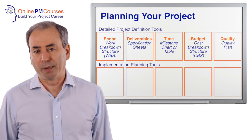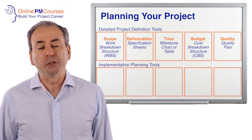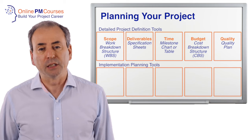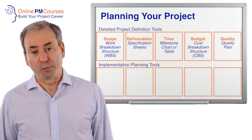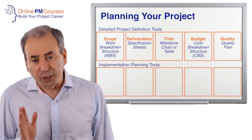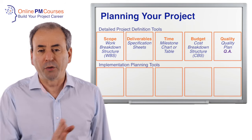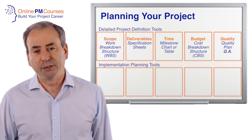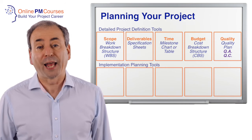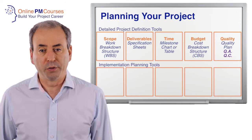Quality is the fifth component of our project plan, so you should have a quality plan which documents how you're going to ensure that the quality of all your deliverables meets the standards set out in the specification documents. Often this will involve two separate processes: a quality assurance process, which makes sure that the production of deliverables is designed to meet the specified quality; and a quality control process, which makes sure deliverables are not handed over until they've been checked against quality standards.